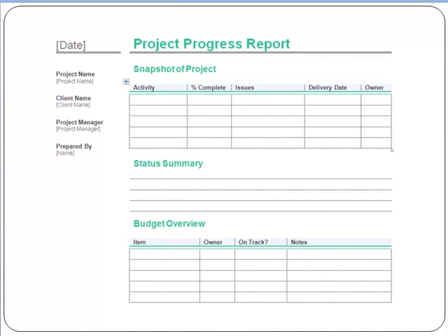Remember one thing, friend, this is just a sample report. Just take it as a sample. It is not a hard and fast rule that the progress report should look like this. I just want to show you a sample in which you can mention the task percent complete, which tasks are completed, which are remaining, and when the remaining tasks will be completed.